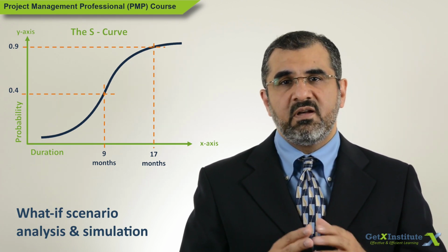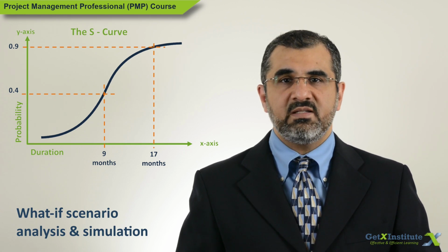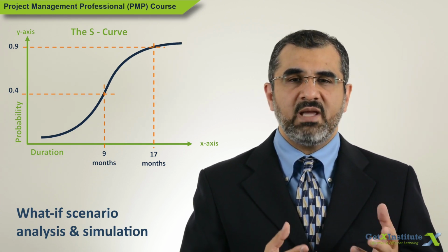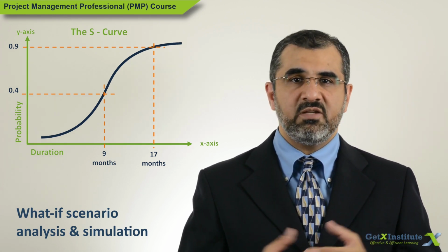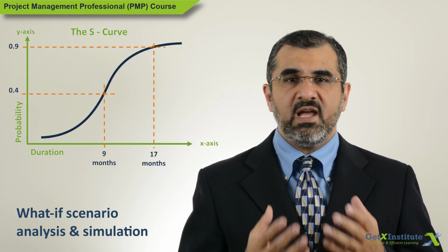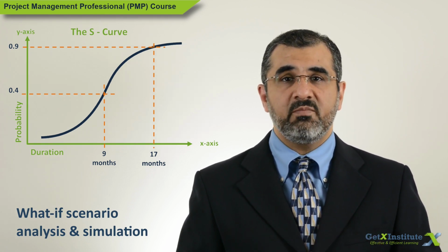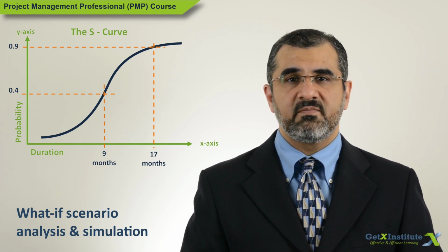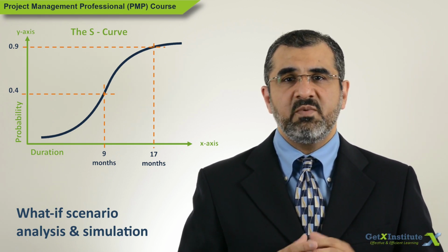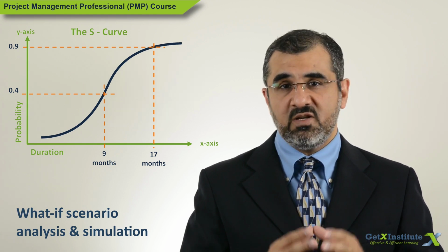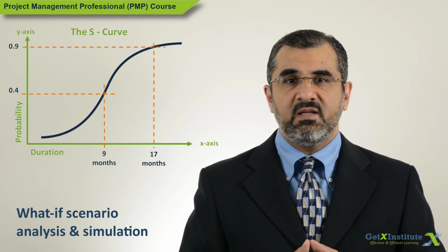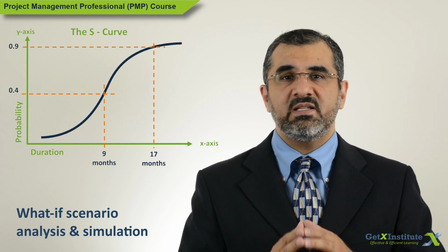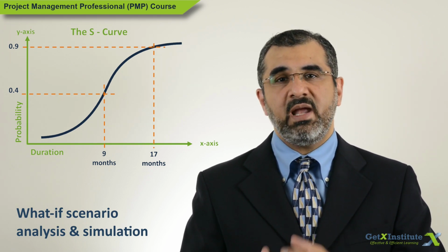The S-curve resulting from the Monte Carlo analysis, which took data from a new method that I developed during my graduate research, showed a 10-month delay from planned completion with a 95% confidence. That is because on the S-curve at 0.95, the corresponding date was 10 months later than the planned completion date.